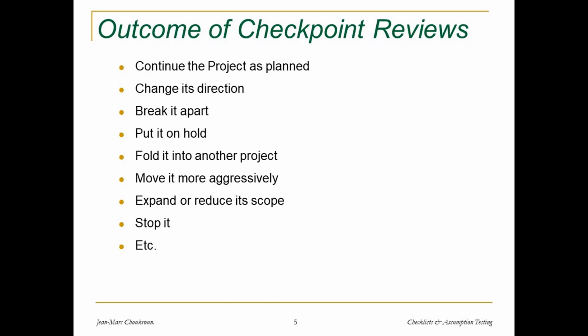So the rhythm is: first the after action review, identify initiatives to take as a result of the after action review, then integrate that into your agenda for the next phase, and then do your before action review before you start the next phase. Okay, so I really encourage you to bring those two ideas into your project management style and your team meetings. Always start with a review of what we've done and end with an anticipation of what may happen. And then repeat that as a rhythm and as a standard agenda for all of your meetings.